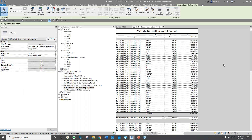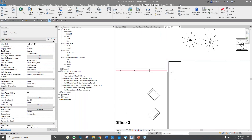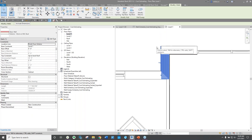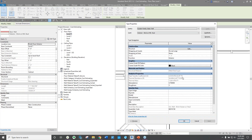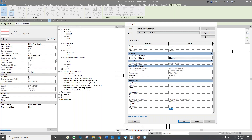Hopefully you are seeing on your screen at this point a wall schedule — this would be a content or family-based takeoff with its area and its cost. Where do some of these parameters live? I'm going to switch to my floor plan here, zoom in, and grab one of my walls. You're going to want to click Edit Type, and then under Edit Type all the way at the bottom is a cost associated with that particular wall type.